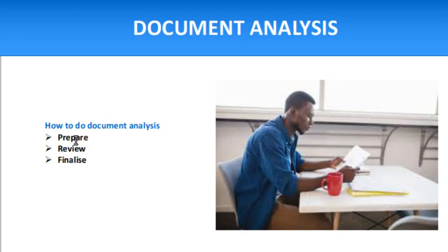Once all the documents are available at one place, you have to review them. Secondly, you have to understand that that doesn't mean you are reviewing all the documents. You have to review the documents which are pertaining to a particular stage. For example, you are at the planning stage, so you have to analyze the scope document, you have to analyze